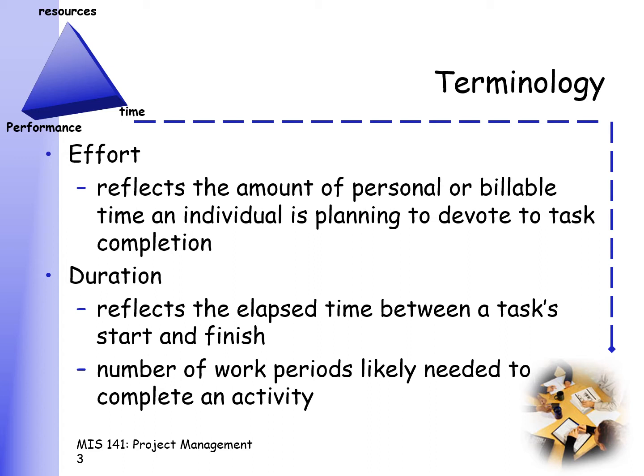Now, effort is totally different from duration. Duration really reflects the elapsed time between a task's start and finish. Well, a duration can be the same as effort. When can duration be the same as effort? If the effort is 100%. So, if the effort is 100%, and the duration takes 4 days with a person giving 100% of his time, then really that 4 days is the whole duration of the project.